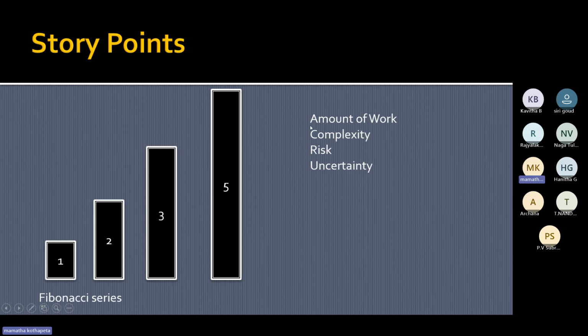Vice versa, we give numbers for each parameter and we add all the numbers. For example, if I add all the numbers, 10 is coming or some other number. Like this, we give numbers to all the 10 requirements. Each requirement is discussed on these parameters, and one number is given to it by adding all those things.